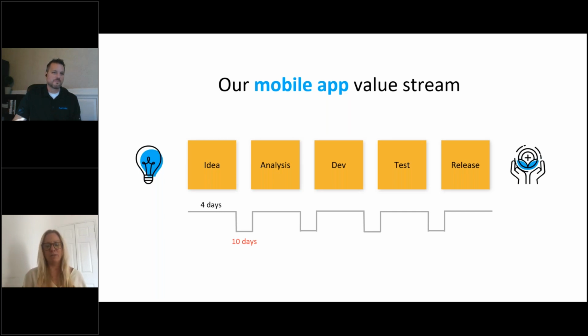And then the other thing the facilitator needs to do is keep the team focused on the job in hand. Typically a value stream mapping session will fall into two parts. The first part is identifying the current state, and the second part is building the future state. So if somebody's going, I've got this incredible idea, we should be doing this, but you're on current state, that's where you say, that is a brilliant idea, but we're solutionizing for the next stage of work. So we're going to write it down, put it over here, and come back to it tomorrow or next week, or whenever we've been rescheduled to do that next stage.